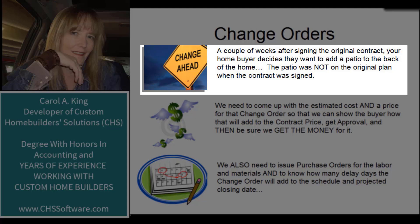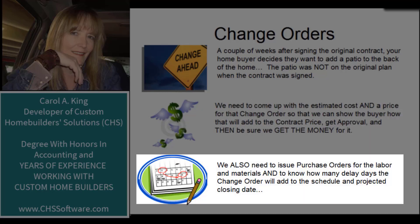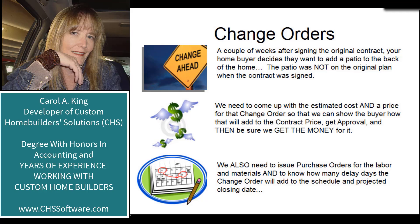A couple weeks later, after setting a contract price and getting the contract signed, our home buyers have suddenly decided they want to add a 400 square foot patio off the family room — not on the original plans and not included in the agreed-upon contract price. We need to estimate the cost for that patio, set a price for the change order, show the buyers how it adds to the contract price, collect the money, issue purchase orders for extra labor and materials, and determine how many days it will add to the schedule and projected closing date.